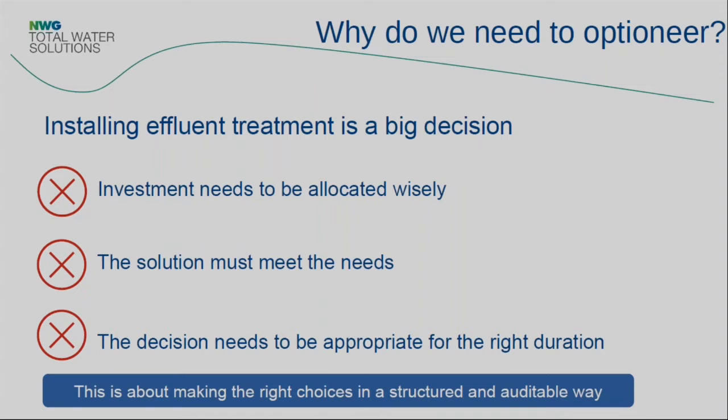And when we considered the options in detail, what we found was that actually the temporary plant would be the best option. There was no point putting in a permanent plant, even though some people favoured doing it. The temporary option was by far the better one. So when you consider options, you need to consider the timescale over which that option or that solution will be needed.